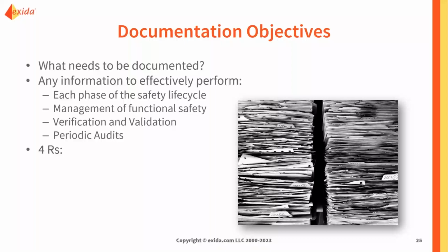And then the mnemonic, to remember it, we use the 4 R's. So we've got to have the right data or the right information in the right format. So something that we can use, bring forward at the right time. So we have it at the right phase of the life cycle, the right phase of the project, and in the right place, stored somewhere, again, where people can find it, where it's known where the hazard information is, or where the safety function design is.